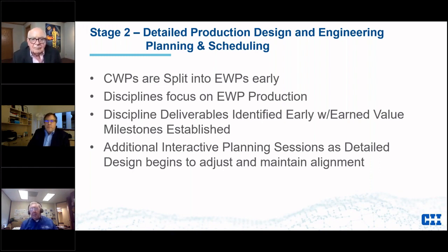Personally, I'm not a big fan of earned value. What I do like from Lean is, is it done? Yes or no? More of a commitment base. With earned value, you can get up to that 90% point, and then it's 91%, and then it's 92%, and it's 92.5%. So I'm not a big earned value guy, really. I want to know, is it done? Yes or no?